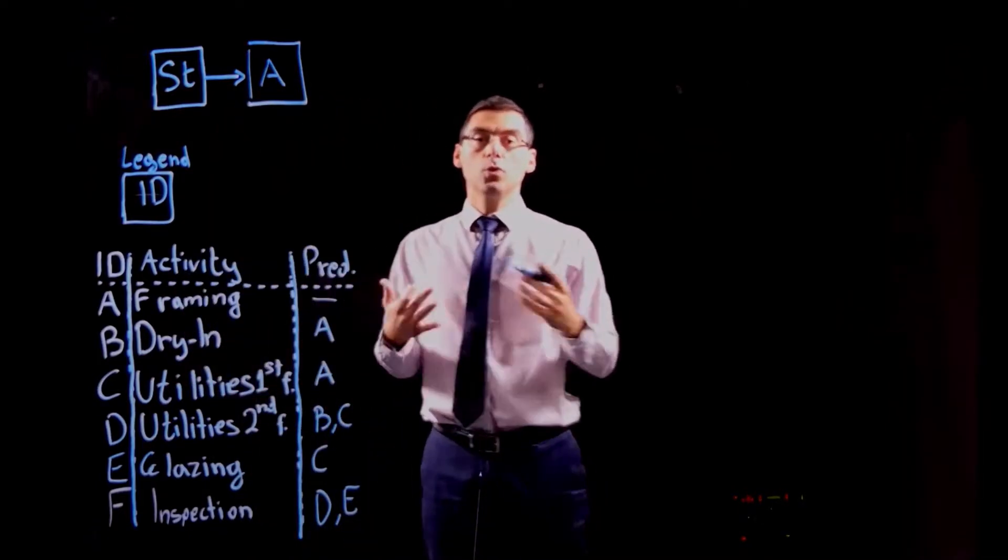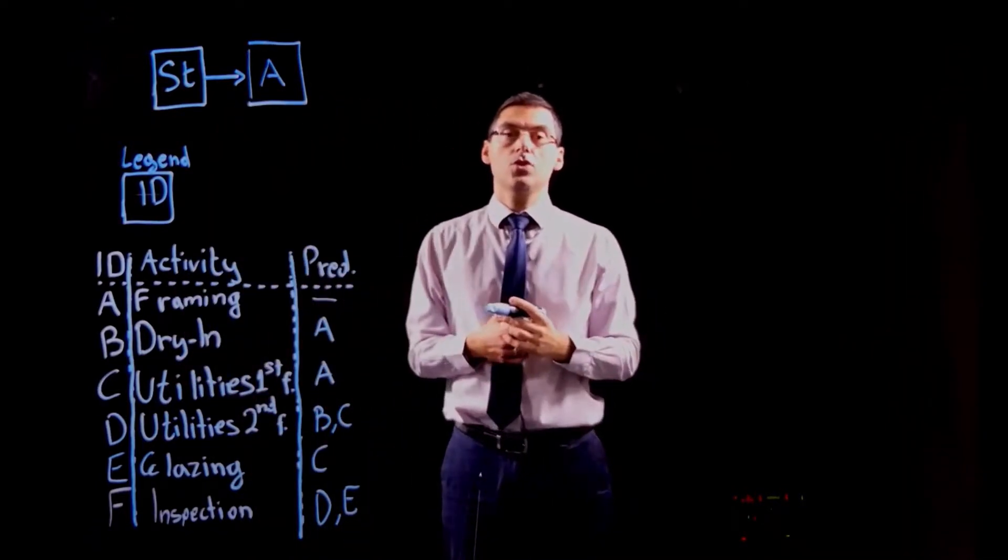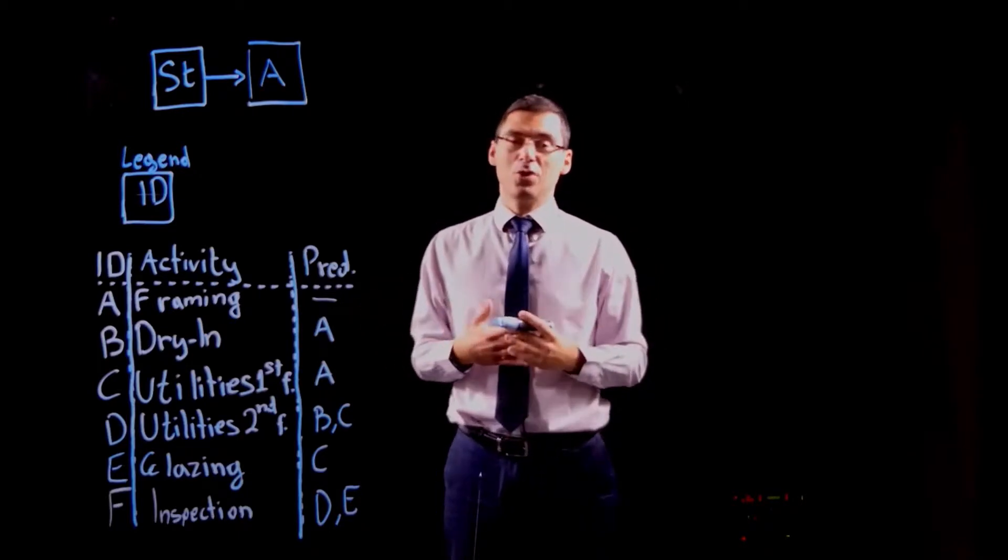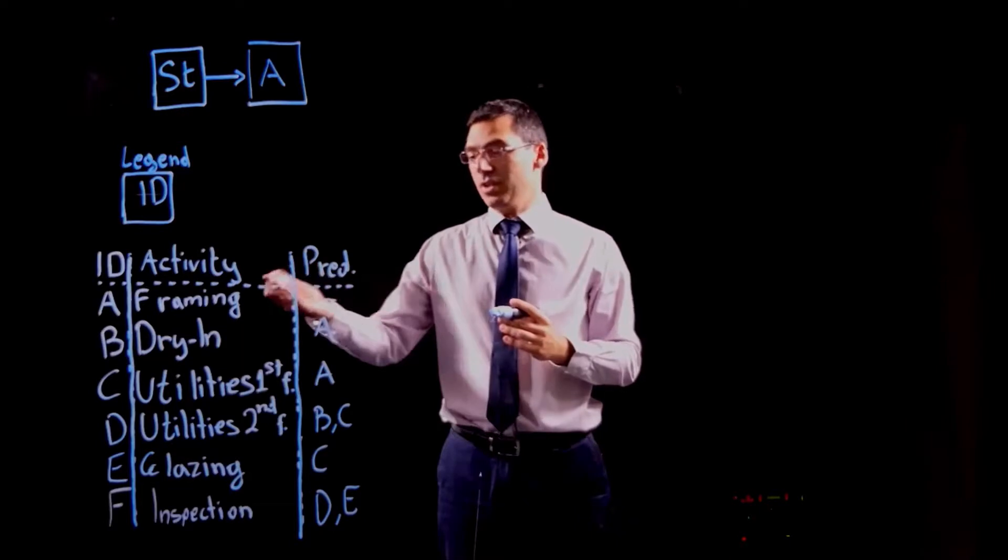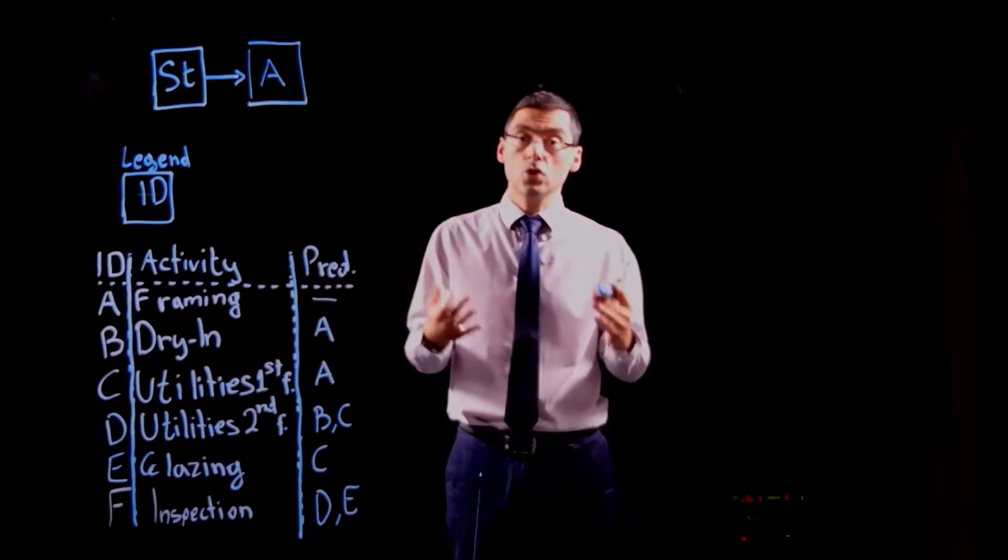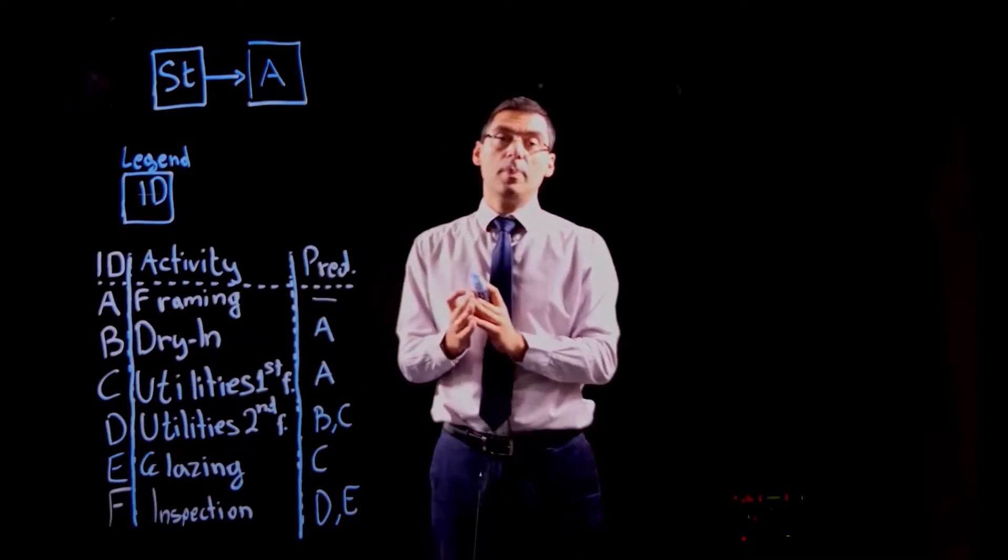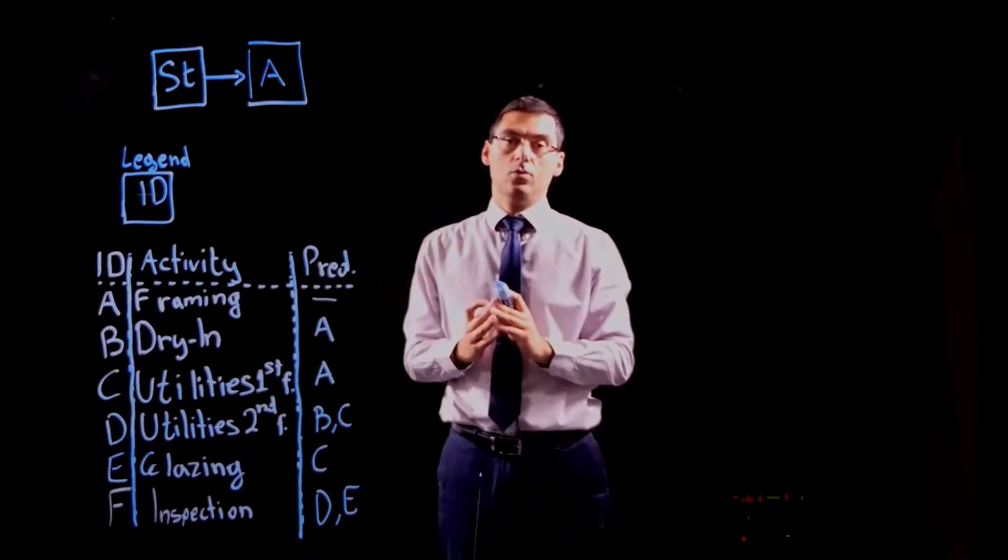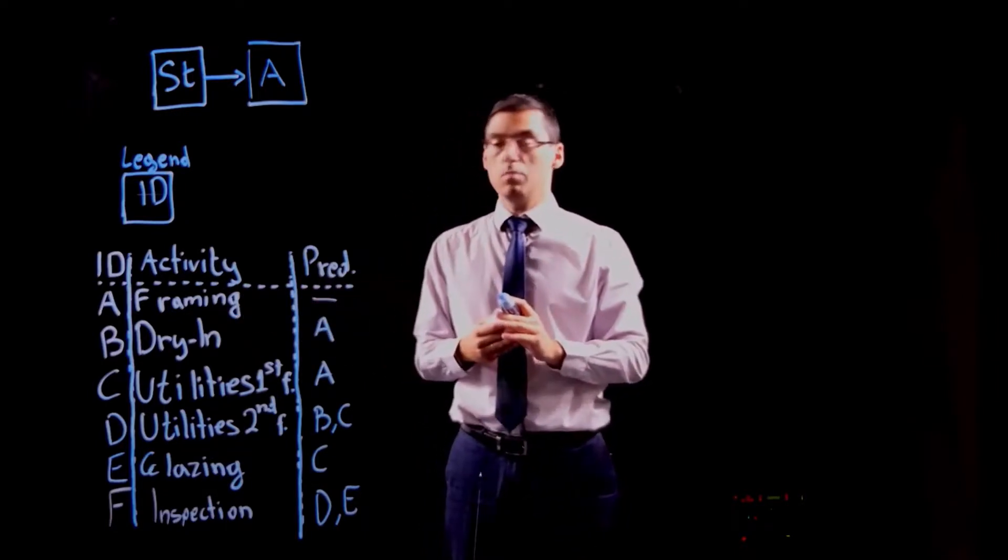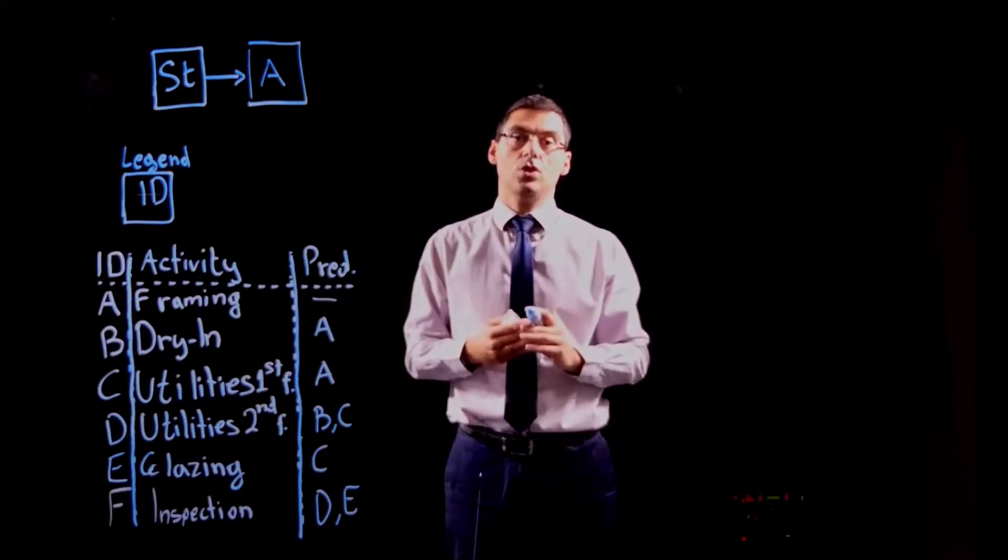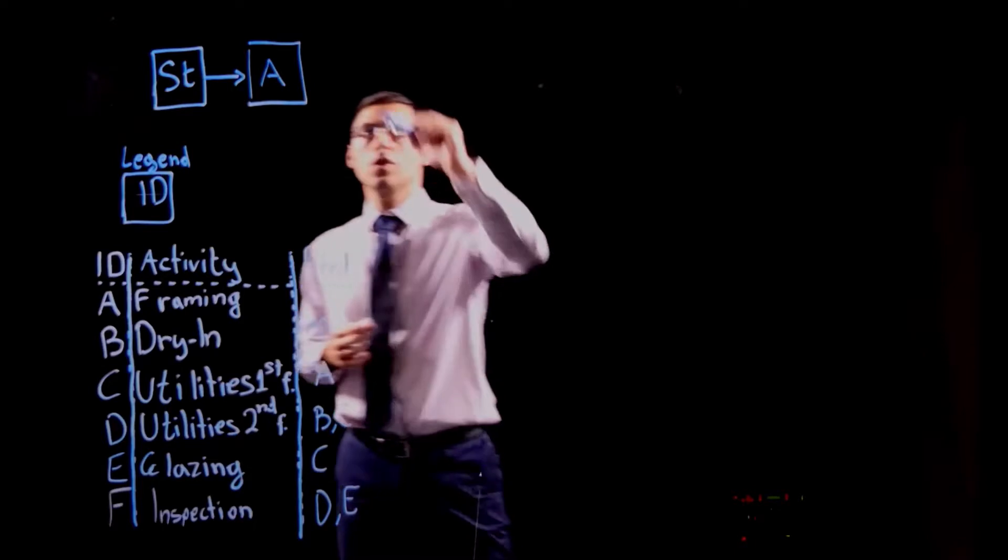Now, after you put all the activities that have no predecessors, you have to pick, the algorithm says, at random, but I bet that you're going to be cleverer than that and you're going to pick the next activity and make sure that all the predecessors of the activities that you're going to pick have already been placed in the network. That would be the case for activity B and activity C because both of them have as a single predecessor activity A.